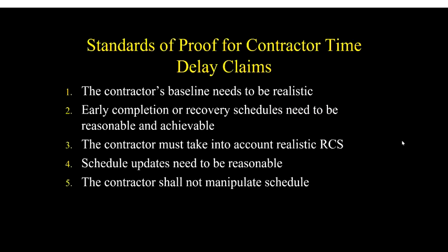That early completion schedule needs to be justified. It needs to be proven that it's possible for the contractor to actually achieve an early completion time. The contractor must show that it has the resources to achieve this early completion time, not only on the early start times, but on the late start times as well.